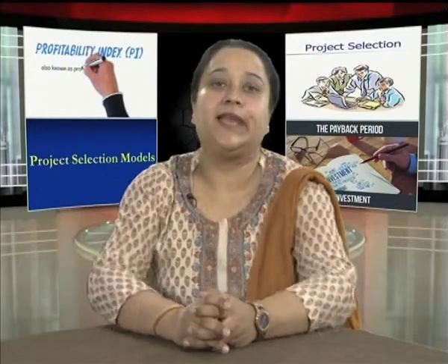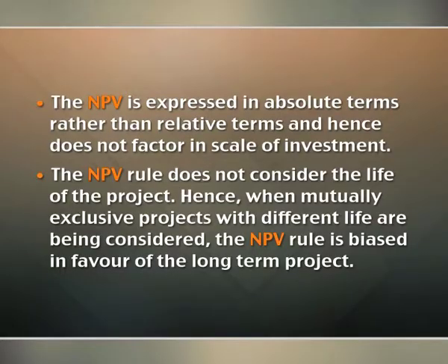Despite its advantages and direct linkage to the objective of value maximization, the NPV rule has its opponents, who point out some limitations. NPV is expressed in absolute terms rather than relative terms and hence does not factor in scale of investment. The NPV rule does not consider the life of the project. Hence, when mutually exclusive projects with different lives are being considered, the NPV rule is biased in favor of the long-term project.